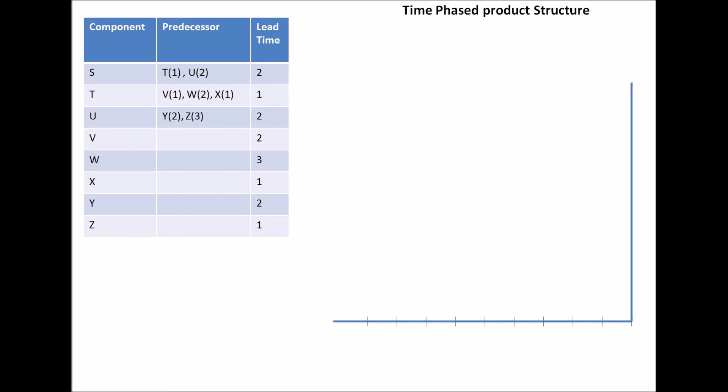First, we label them. We label the X axis with units, which correspond to the lead times. So, first off, we draw the end component that we need to make, which is S. And the length of the line in S represents the lead time, as you can see here.